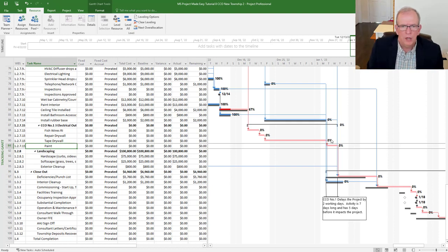It's like, how do you know that? Looks to me like 3 of these change orders happen at the same time, right? So it shouldn't be 5 weeks. It should be actually 3 start at the same time, and the other 2 start at the same time. It should be 2 weeks. And she said she'd be more than happy to allocate 5 weeks if they could justify it and indicate how it's impacting it. But they weren't sophisticated enough to put changes into the schedule to show that. You want to be able to explain things and be transparent.